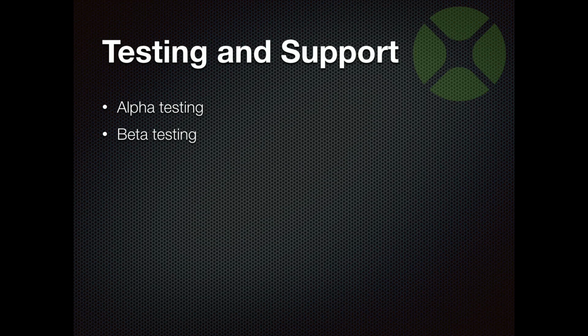The beta testing usually involves them. Maybe some core users. It could also be that it's rolled out to everyone. So if you're doing that, that's also something to make sure they understand it's beta, there will be bugs. So if you have people that aren't really comfortable with buggy software or being able to report bugs clearly, maybe that beta testing needs to not be rolled out to everyone, maybe just a small group.